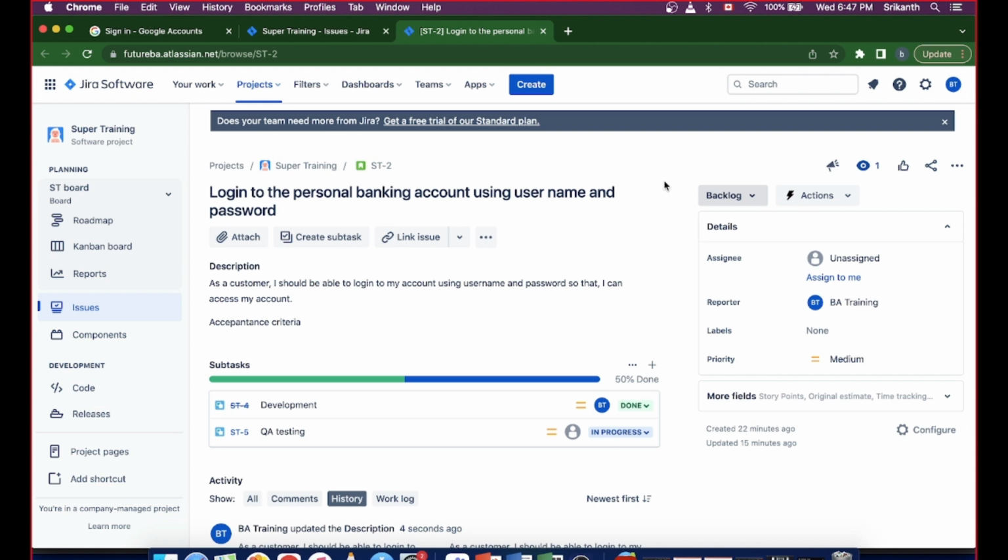Okay. Got it, Sam. So in that epic, transfer funds using Interac, or transfer funds using wire transfer, or using some other method like email, will be different story cards. So transferring funds can be an epic by itself because you can have like 10 types of funds transfers, and you can club all of them into one epic.